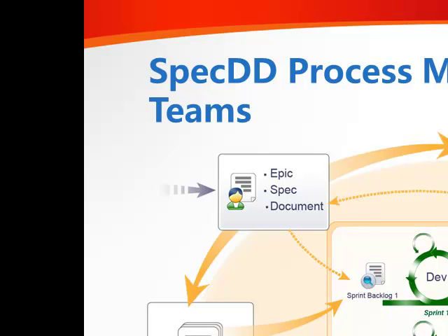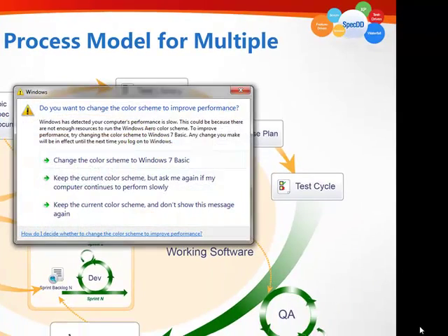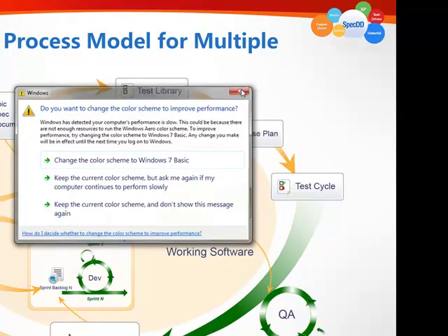However, you have your product backlogs tying into creating the stories and being populated into the sprint backlogs to drive each sprint for one development team. You will only have one sprint backlog per development team. Sprint backlog does not span across multiple teams. Your product backlogs will always be less than your development teams or equal to your development teams. It doesn't make sense to have three product backlogs and only one development team.